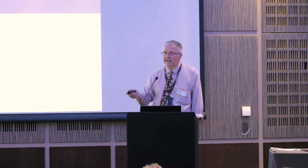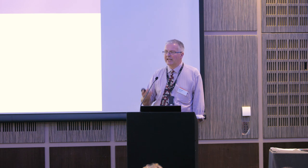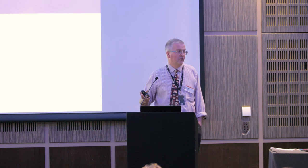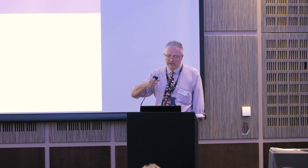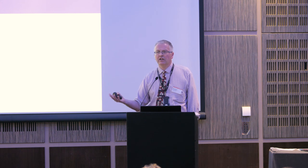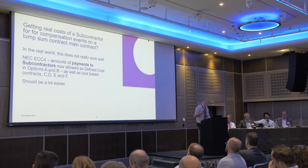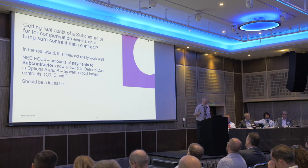Luckily, NEC4 has fixed this problem. It's now allowing payments to subcontractors — which is just common sense. A subcontractor comes to you with their compensation quotation; you pass on a single fee percentage on top of that quotation from the subbie, which becomes part of the defined cost of the contractor. Hopefully that bit should be a lot easier in NEC4.